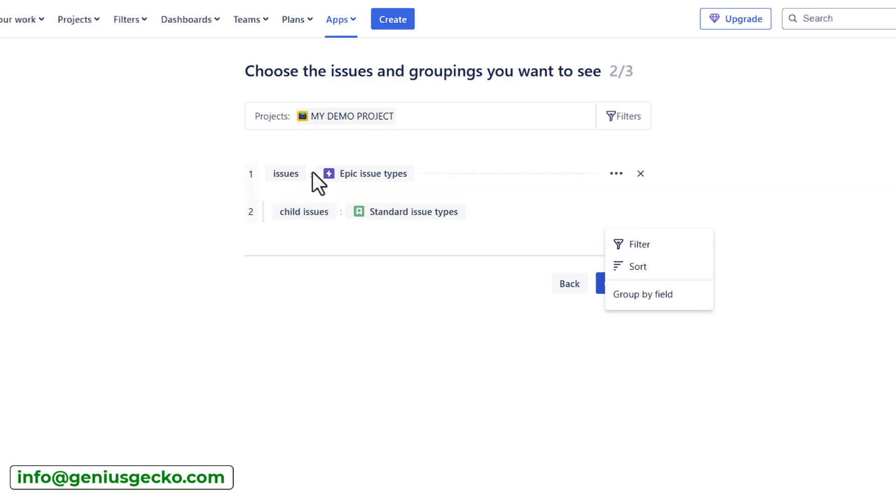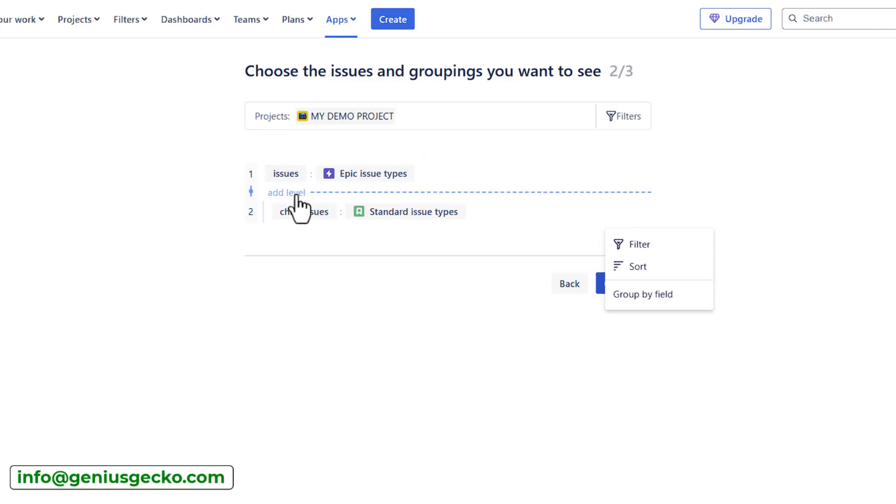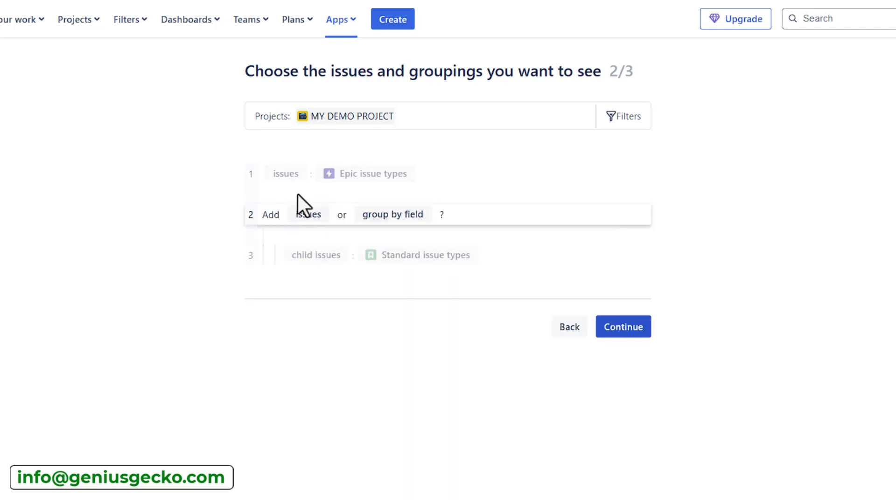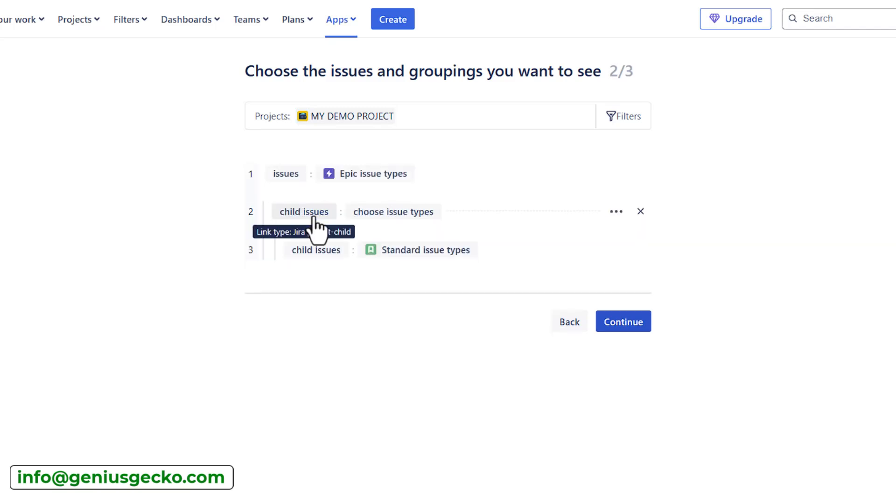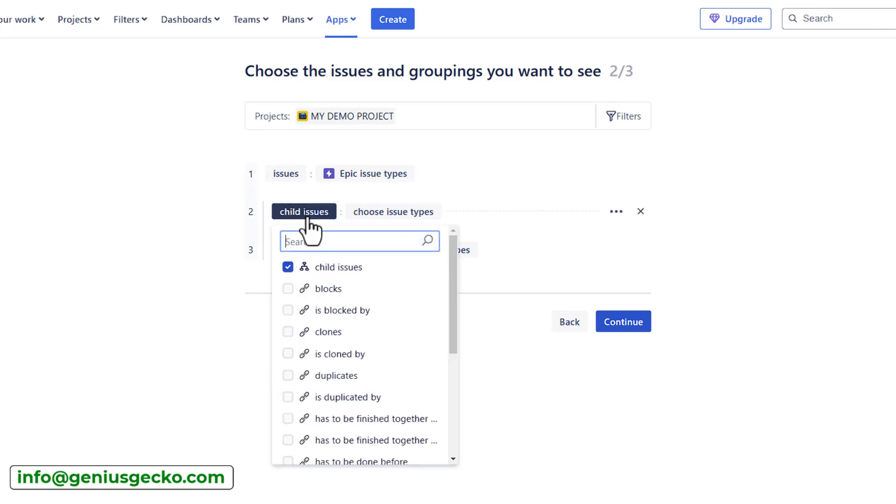If you want to add a level above or below the epic, hover over the space between the two rows. You will be asked whether you want to create a level based on the issues or group by a field. When you select issues, you will need to select what would be the child issues. In that case, structure uses links.